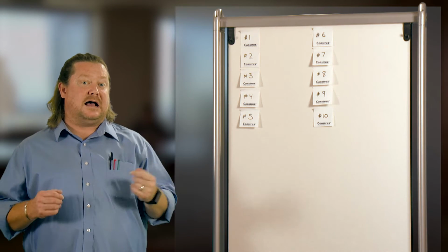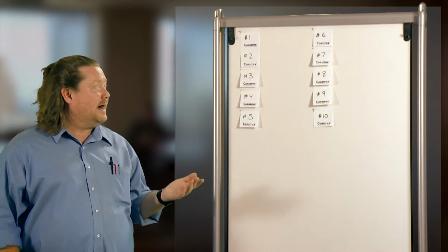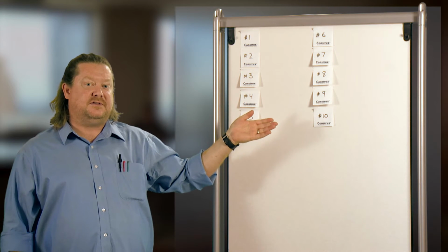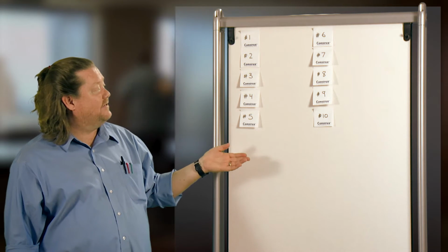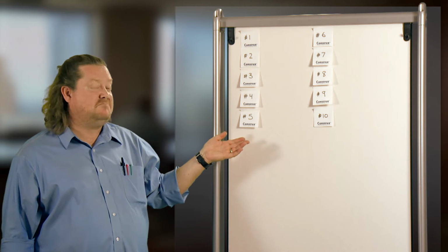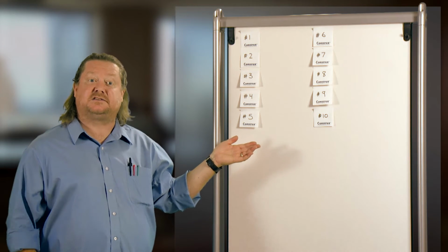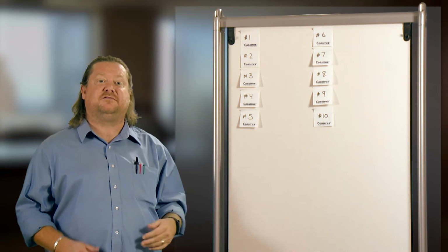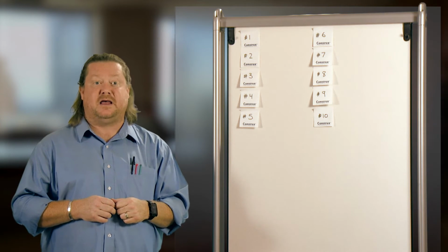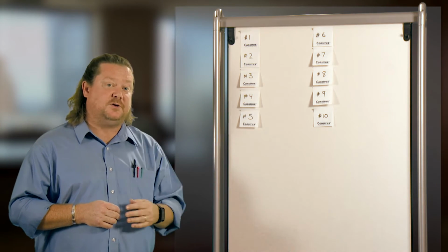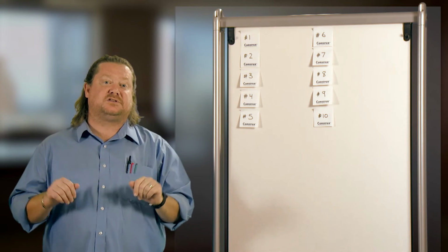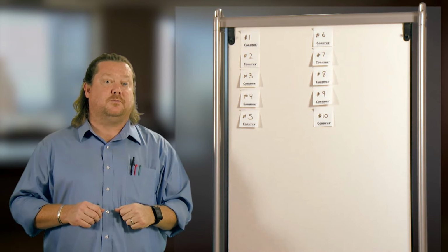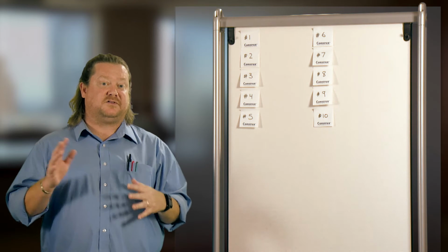In general, as the facilitator, as a Scrum Master, I like to take the total number of items and divide them by 2 and maybe add a smidge. In this case, we have 10 items, so I would take half of that and say, guys, you have 5 plus maybe 1, 6 votes. And the team members get to vote using those votes for the stuff they think is important. You can distribute the votes however you want. You can put 6 votes on one item if you think it's really, really important, or you can put 1 vote on 6 items if you have a lot of different stuff you're interested in.